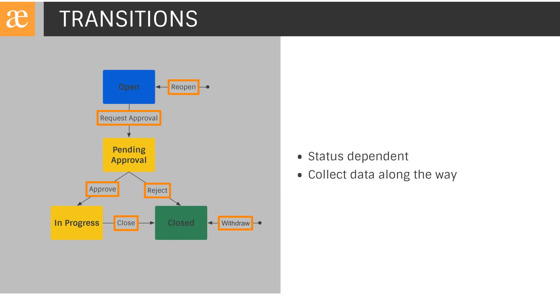Transitions are tied to statuses and describe how we exit the status. It's at the transition where we can define the core of our business rules. Here, we can put conditions and validators against the workflow item to enable process controls. Additionally, we can collect information from the user in a time-sensitive fashion as we progress through the workflow. It's common to have decision points in workflows. In practice, this translates to having multiple transitions out of a single status.